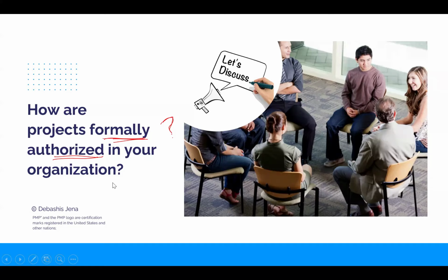Sure, I would like to. Please go ahead. In our organization, the process that they follow is we have a kickoff meeting wherein all the stakeholders, including the sponsor, are invited. They share the vision, or the purpose or the agenda of the project. They make everyone in that room understand why they have chosen this project and what the expectations are. Then we have a formal introduction of everyone present in the meeting, and that is how we start the project. Very well, Santosh, thanks for sharing a kickoff meeting.